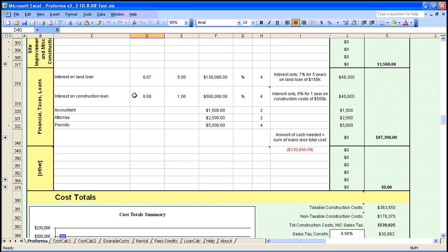We'll also need a construction loan. We're assuming that $500,000 is the amount we'll be able to borrow for that at 8% for 1 year. Estimating the duration of a construction loan is nearly impossible because loan draws depend on time spent permitting, constructability due to weather, and other unknowns. So we're assuming 1 year duration at the full amount of the loan to calculate the interest cost for the project, which comes to $40,000.